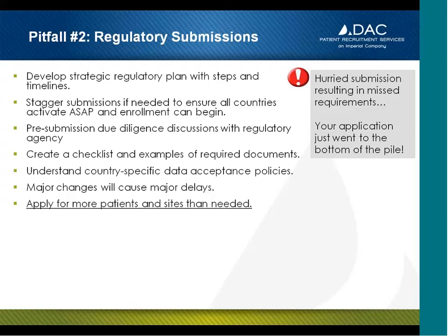Last but not least, major changes cause major delays. So as we mentioned before, if you can really try to finalize the protocol before your submission as much as possible, that's going to help you. If you later want to go back and make edits to that, in many countries you're going to run into problems, because it's going to ultimately require amendments to be submitted, and often your application will fall back to the bottom of the pile. So you really want to try to avoid that.